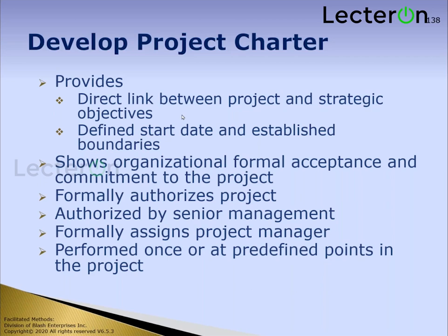Formally authorizes the project, which is done by senior management, formally assigns the project manager. Now, this one is often misunderstood because in many cases, it's the project manager who creates this document. But you cannot authorize yourself to spend money, which is why you may create a draft of the document, but if you actually do it, it should be distributed from somebody in senior management that's going to give you the authorization to do this.